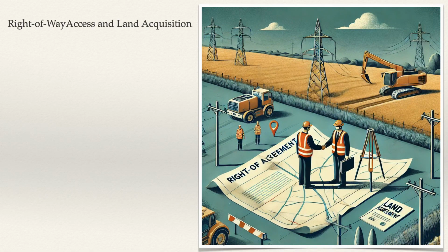Three, right-of-way access and land acquisition are handled by the client, contractor, or a third party, depending on the terms and clauses specified in the contract. Securing ROW often requires access across private, public, and tribal lands. The agencies must work closely with the client to secure the necessary ROW by negotiating with landowners, government entities, or indigenous communities as required. The ROW process includes A.